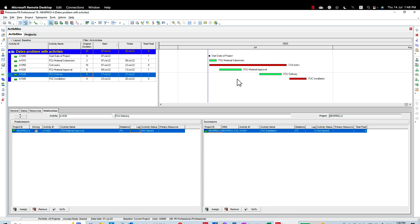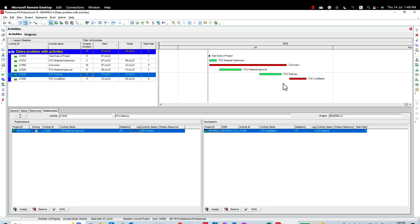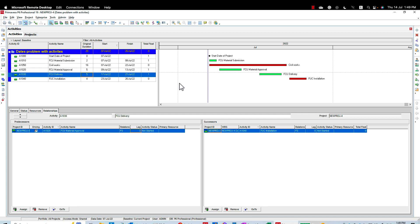So here I have one day float. I moved the procurement a little bit, and the reason I moved the procurement date is when I'm going to update this schedule, it will not show delays. If it is planned to start here and the site people didn't procure the material because it is early, then my schedule will start recording delays. So now I'm going to start on time and I have a contingency period in the delivery, and this is in my opinion the best scenario to fix your procurement. I don't recommend to make all your materials critical or near critical. Even here we have a very simple schedule, but in the real schedule I might have 10 or 15 days of float here. I hope you found this video useful to you. See you in the next one.